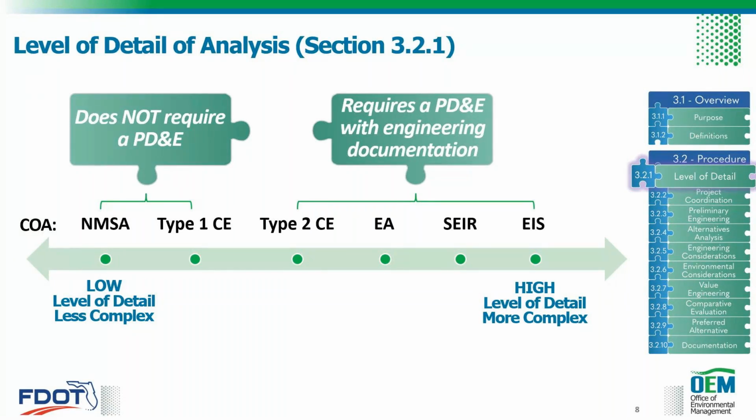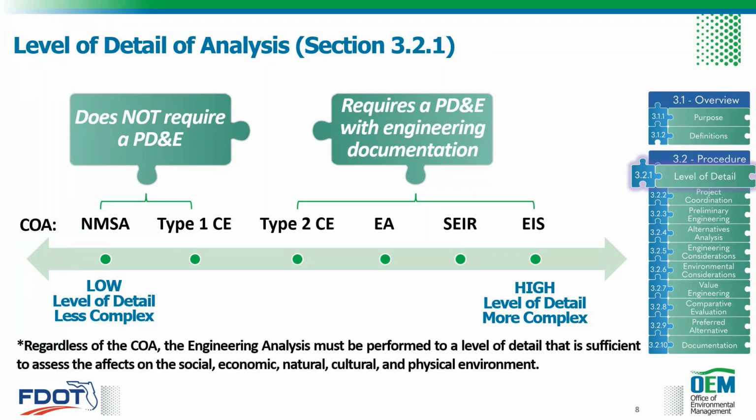The level of detail is also based on the future plans for the project, whether the project is anticipated to go design bid build or design build, whether it's being fast-tracked versus being put on a shelf. It should be noted that the timing of the class of action decision is being delayed until closer to the public hearing. But regardless of your class of action, the engineering analysis must be performed to a level of detail that is sufficient to assess the effects of the alternatives on the social, economic, natural, cultural, and physical environment.